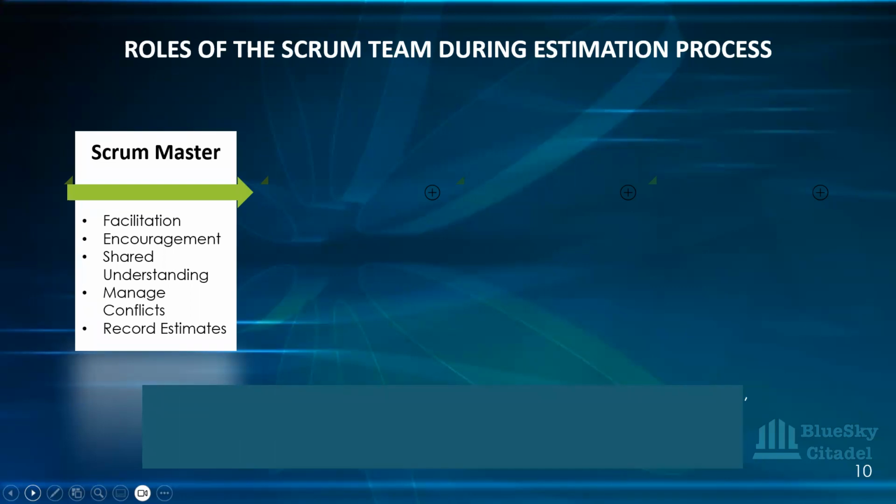That person can ask that question and get that clarification from either the PO or the BA, and that would affect every other person that wants to vote, to say, oh, if that's the case, then I thought I was going to give it a 3, but it won't be a 3 because it's more work to do, and then I will give it a 5. So shared understanding doesn't stop when the story has been read and you've asked, is everybody clear? Let's go to estimation. When they want to estimate, if anything pops up, you allow it, because it's still part of shared understanding.